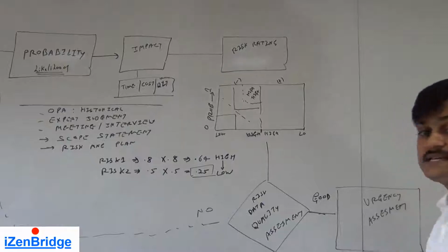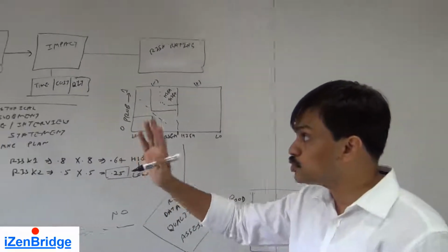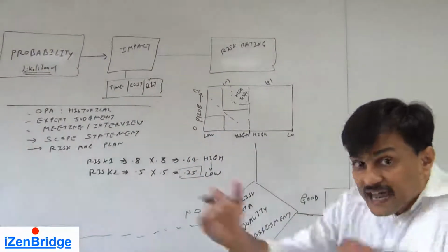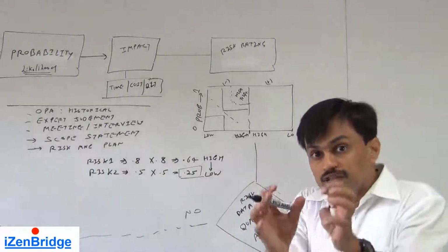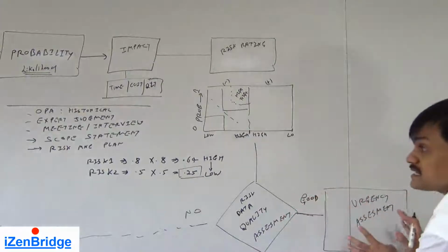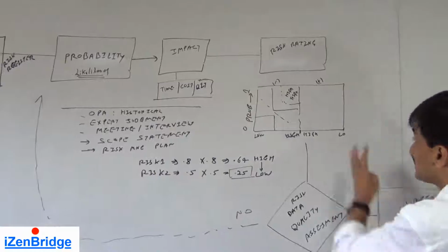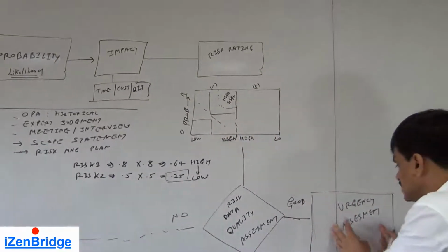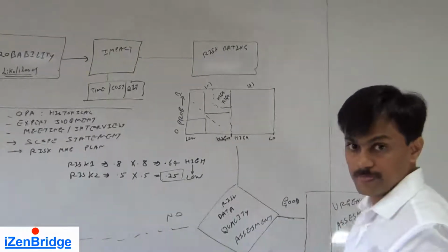Now risk urgency is a third dimension. Here we were talking about two dimensions, probability and impact. The urgency is saying, in a time frame, how urgent this risk is, how soon the impact is going to happen on our project. Sometimes this risk urgency assessment may also get clubbed in impact, meaning while giving a risk rating or a risk ranking, we pick this urgency assessment factor along.